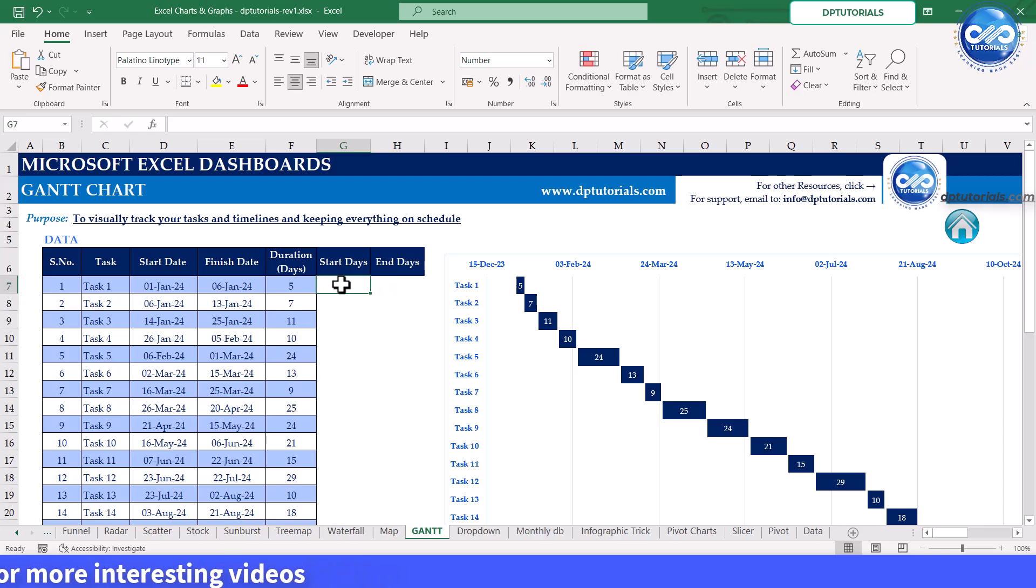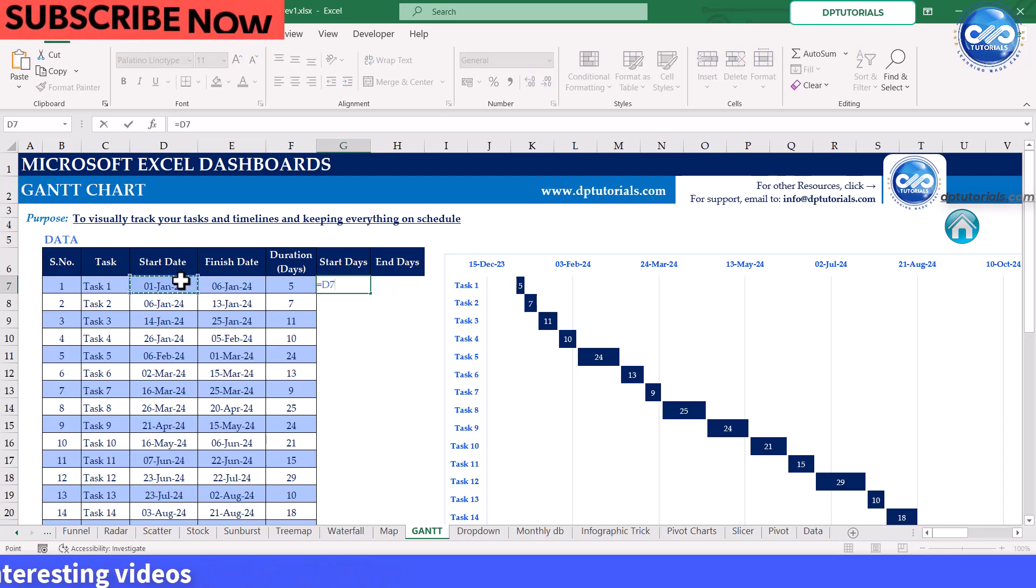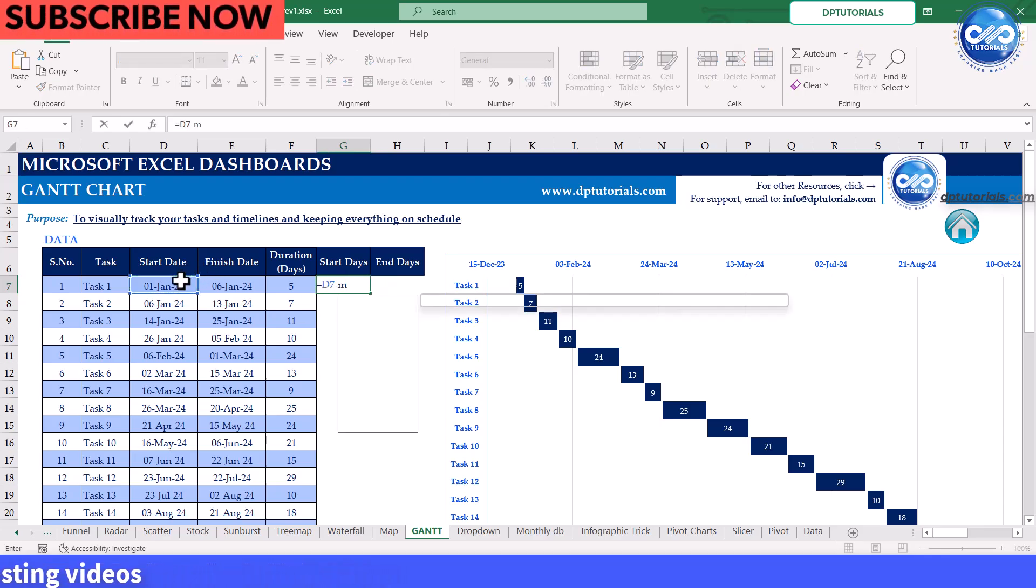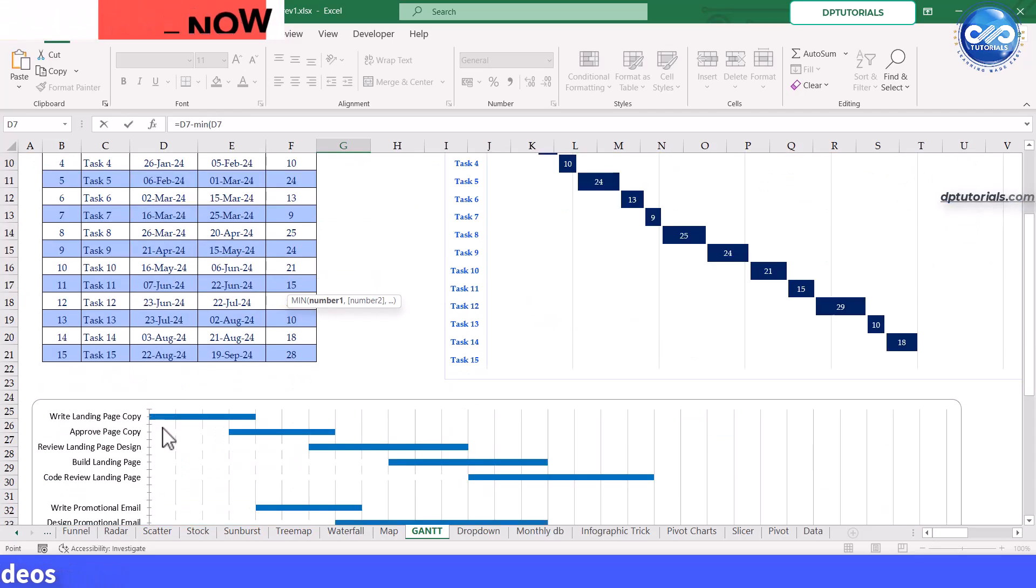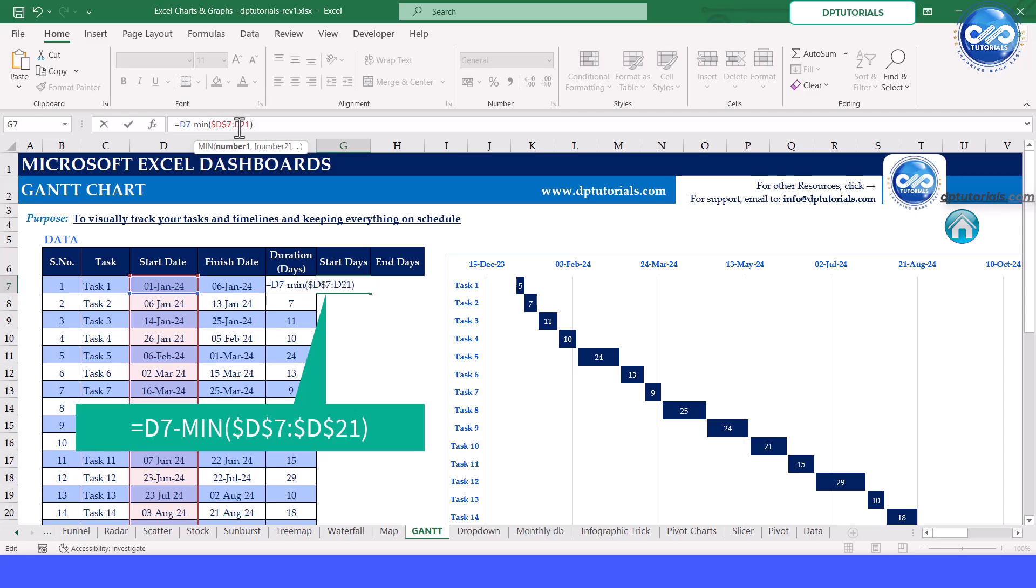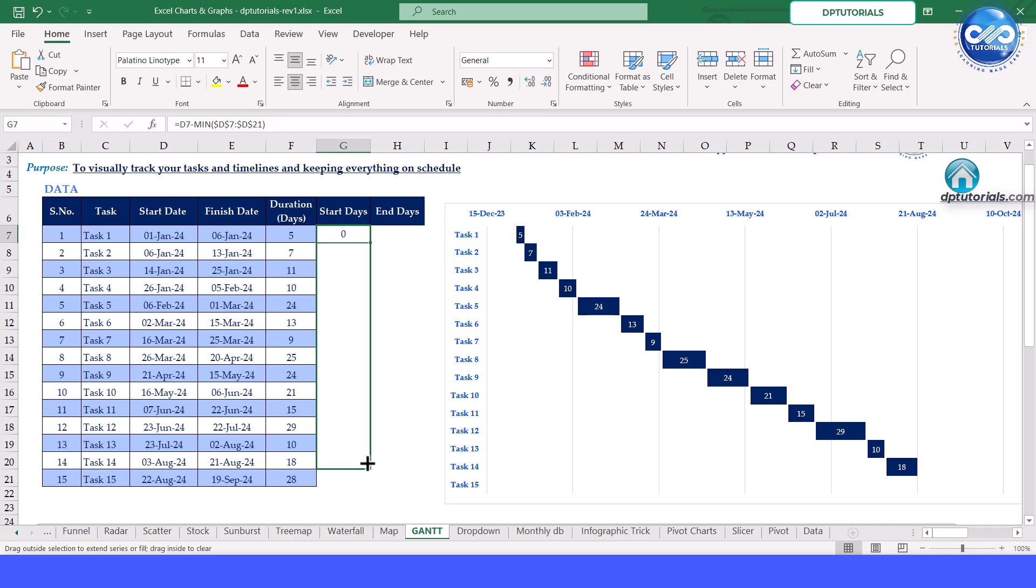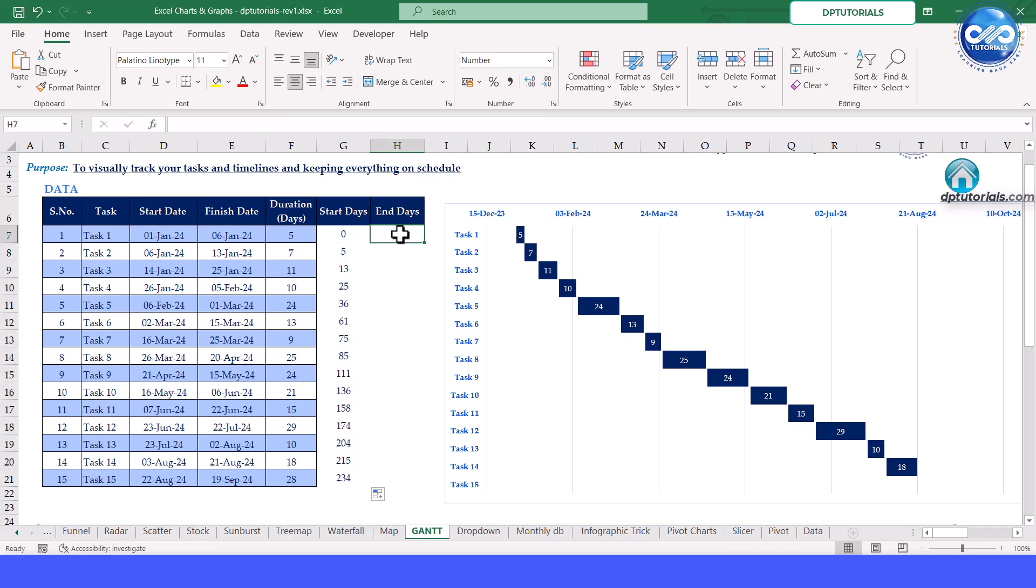Use the formula equals start date minus minimum of the start date range. Close the parentheses, lock the references, and press enter. Drag it down to calculate for all tasks. For end days, just copy the duration column as is.